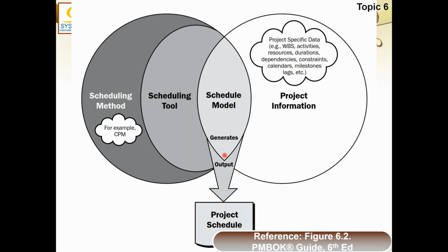Requisite changes are made wherever they are to be made, but again it becomes wobbly. It starts vibrating again. So again I have to see the impact of different things on it, and very slowly and steadily we will wait very patiently for it to stabilize, and as soon as it stabilizes, we again re-baseline it. So this process will be repeated every time a change request is approved.